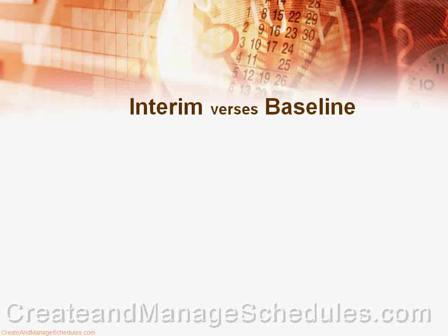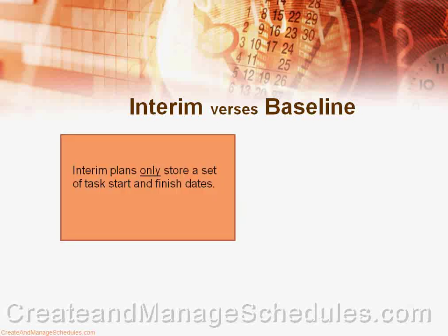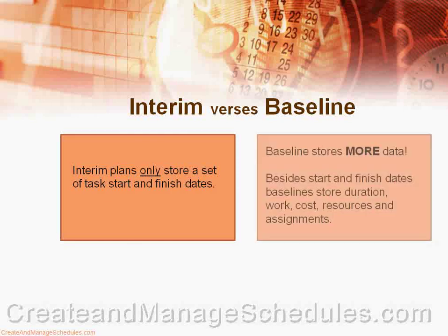So, what is the difference between an interim plan and a baseline plan? Well, basically, interim plans only store a set of tasks, start and finish dates. And baselines store a lot more data. Besides start and finish dates, baselines store duration, work, cost, resources, assignments, and more.